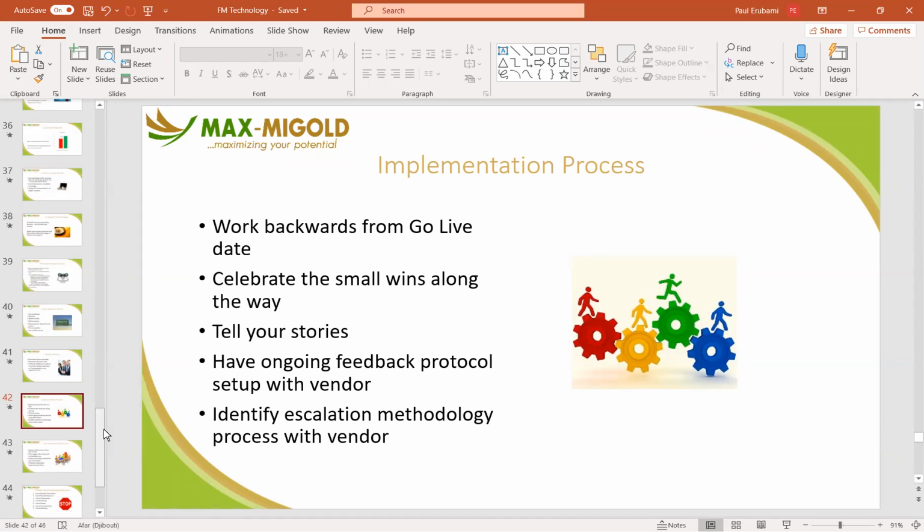Let's take phase 1. We'll plan our job in such a way that it will be phase 1, phase 2, phase 3, phase 4. So we'll be going little by little. Phase 1, let's get our asset register. Phase 2, let's get our processes in place. Phase 3, let's use a small spreadsheet to automate it. Stage 4, we'll get a trial, a demo software that is free online, and then we'll start using that to learn how the software works. And then stage 5, we'll start investigating which software will meet our needs. Stage 6, we'll deploy, we'll employ a consultant, and so on and so forth. We'll take it step by step.